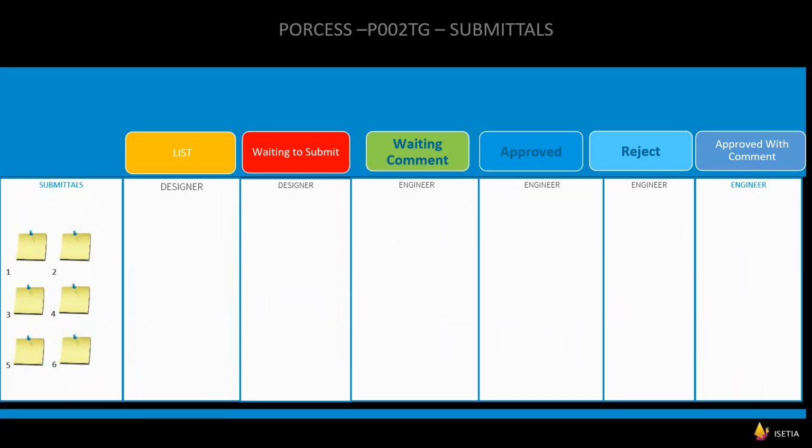So package 1, let's call the designer, is preparing the documents, and they may have internal evaluations. The internal team can check that the document is ready and waiting for submission. The designer then submits the document to the engineer and waits for approval. During this time, we can start the documentation of design package 2, or deliverables package 2, also having the same process.